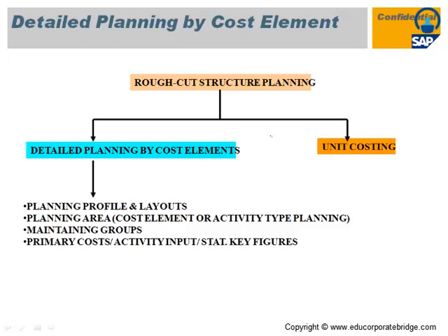Planning is the initial stage where you do your plan cost, and once the actuals start, you can compare plan versus actual. You can maintain the planning in different versions, and after that you can compare the plan versions against the actual versions.